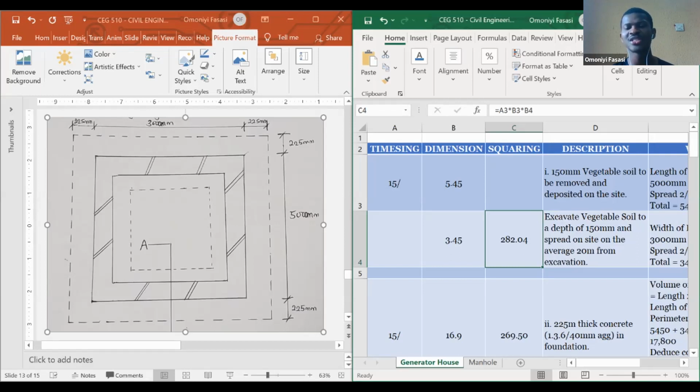Please, I didn't just multiply the length times breadth. I multiplied the length times breadth times the total units, 15. We are doing this for 15 different gate houses, so I needed to multiply. That's why I was explaining that times in earlier. Times in is just saying you don't have to do your calculations one by one. Instead, you multiply. I understand you now. Thanks. Excellent. So can we move to the next one?